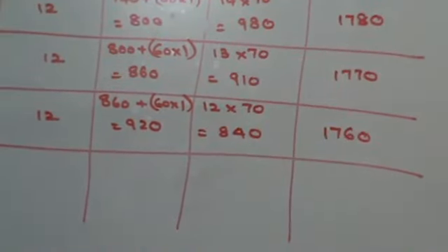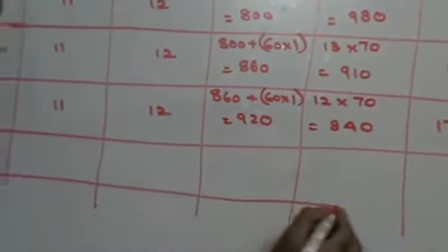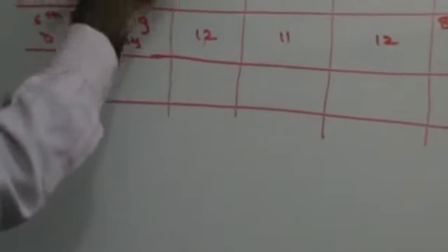Right? Now, the final crashing. I finished crashing D by 4 days. Seventh crashing, D by 1 more day. Now, if I'm going to crash D by 1 day, it is going to become 11. Right? Now, in this case, my critical path becomes less than the other path.